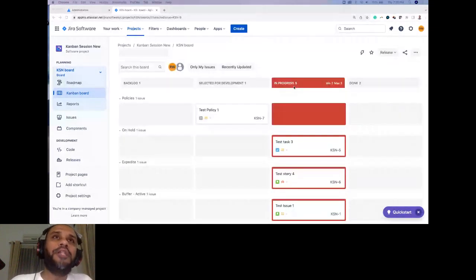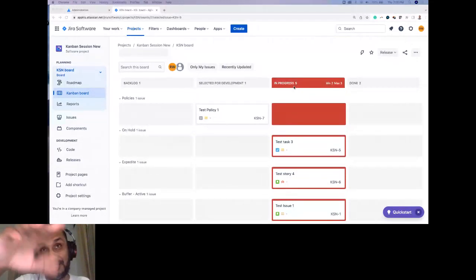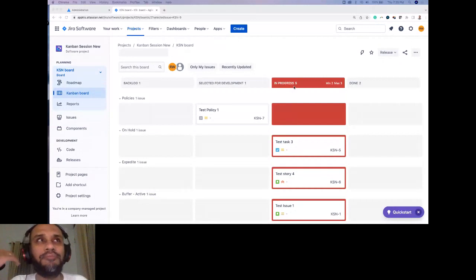What you all will need to do is it's actually a team discussion that you all will need to have and decide, okay, how do we actually do it in the optimum manner? Do we increase our WIP limits? So based on your analysis, you all can decide, right? Per week, how many tickets do we end up having in our blocked state normally? In a week, how many do we have? And based on that, you might actually want to increase your WIP limit. And what are your thoughts on having a separate column for on-hold items?